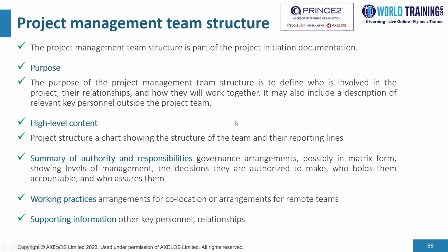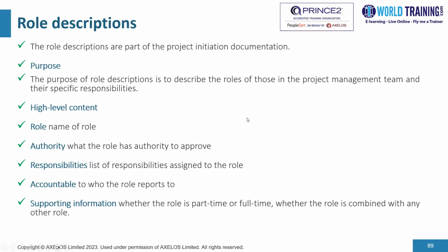Another document that is relevant is the role descriptions. The role descriptions are part of the PID document. The purpose is to describe the roles of those in the project management team and their specific responsibilities. Some of the contents would be the name of the role, authority, what authority the role has in terms of approving things, responsibilities of that particular role, accountable to who the role reports to, supporting information, whether the role is part-time or full-time, whether the role is combined with any other role.